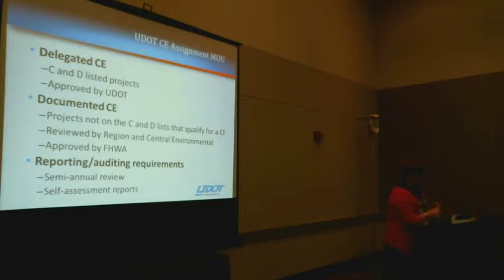And I'll get into that a little bit later when I talk more about the whole CE process. But things we look for are, was it categorized correctly? Are the preparer and the reviewer two different people? Are all the questions on the CE answered correctly? Do you have all of your memos, all your documentation? And if you don't, it goes into the error category.